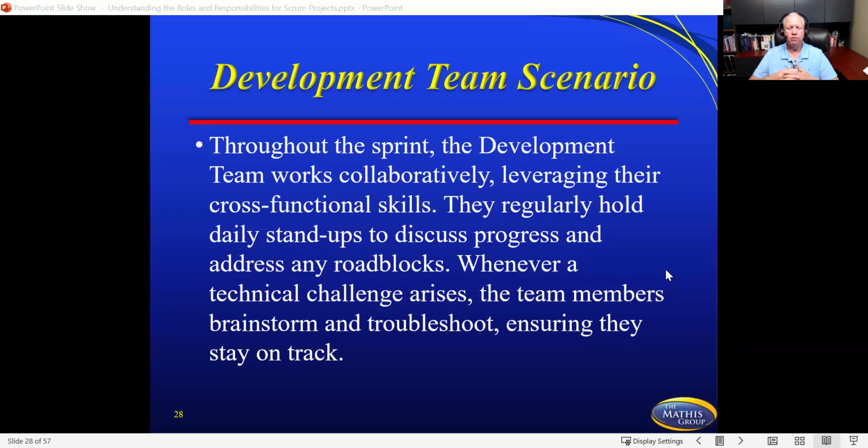You don't have enough resources to work on just one project at a time. So every project team member might be running a Scrum project, but they're working on 3 to 5 projects, which is what we're seeing since 2022 across the country. That's going to slow down the project a little bit as well.